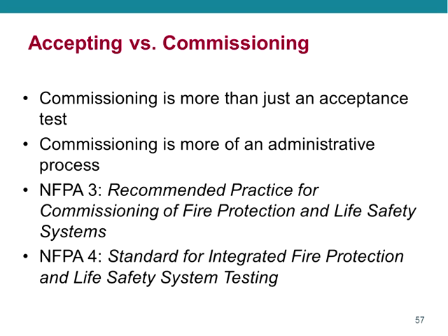So let me just give you a brief tutorial on what the difference is. NFPA 3 is the recommended practice for commissioning of fire protection and life safety systems. Commissioning is a holistic administrative process that takes us from planning pretty much through the end of the warranty period.